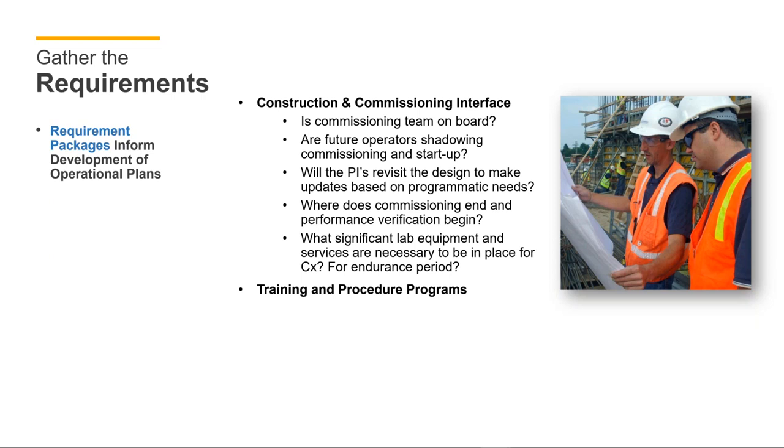Where does commissioning and performance verification begin? In other words, a lot of times what the commissioning contractor is going to do will fall short of what maybe a regulatory compliance person needs. So there can often be a gap there. What about significant equipment, staging, phasing, lead time? Does something need to be in place for commissioning of the building itself? Do we even know what an endurance period is?